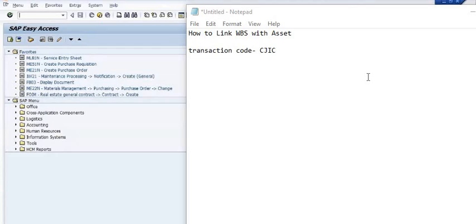In SAP FICO module, we create an asset and that asset is linked with the WBS, and the cost of the project or the WBS is divided or transferred to the assets. This is the whole capitalization process.